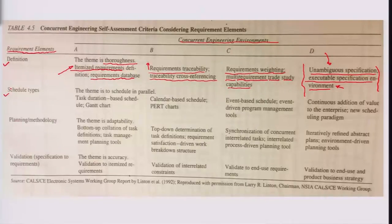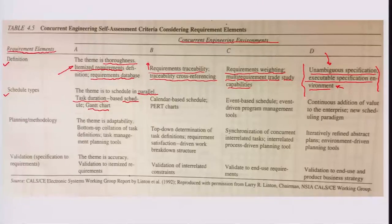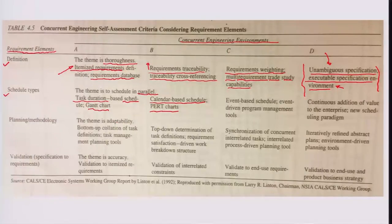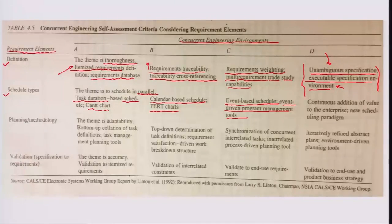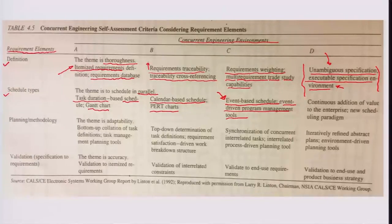Schedule types are also mentioned, where the theme is running in parallel. Schedules could be based on task duration — individual tasks split up from the whole work and Gantt charts plotted accordingly. There could also be a precedence requirement put on all tasks — what precedes what — and then a calendar-based schedule which talks about what point in time on the planning horizon the schedules are running parallel to each other. There could also be event-based schedules where event-driven program management tools are used — for example, if there is a shortage of some material, what tasks exist for meeting that particular shortage. That forms level C.